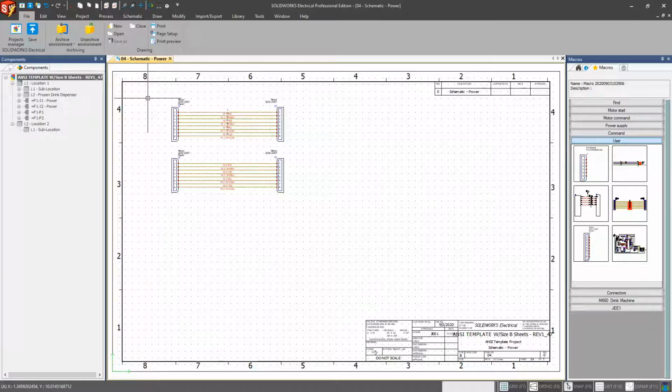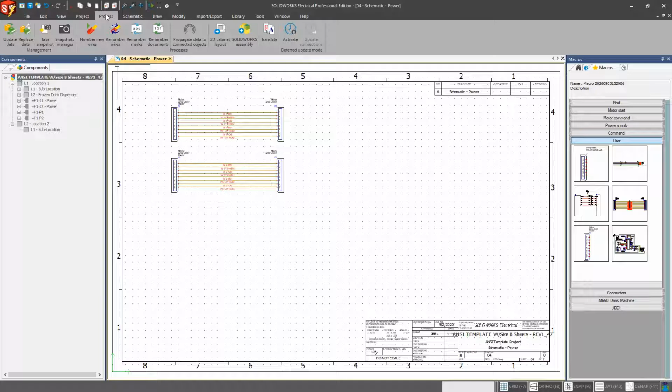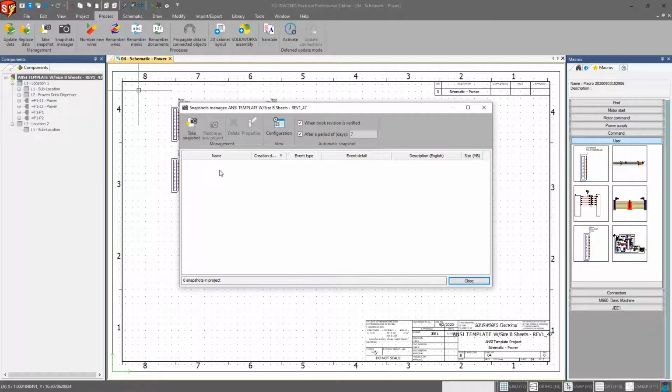Again, I do recommend doing that on some sort of schedule, whatever you feel comfortable with. I can't tell you when and how to do that, but that's to your own discretion. The other type of archiving essentially is what we call a project snapshot. Now, this is specific to projects, not the entire system, where now I can come in and essentially just say, hey, I want to take a quick snapshot of all the progress being made in this particular project.